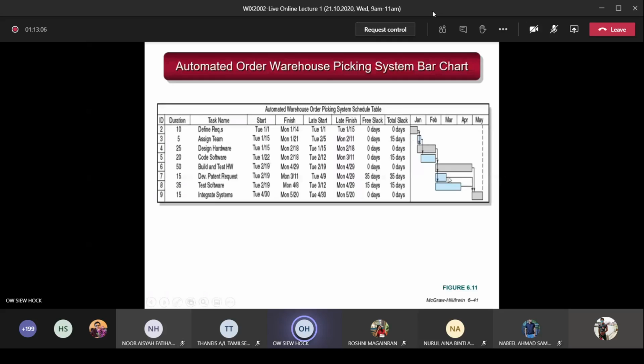If the one that having this one here, it means you got a slack here. Okay, so which one is your critical path? You see this one, all the 0, 1. This one is the critical activity. So the gray one going down all the way down, no extension line. That means these are critical path.